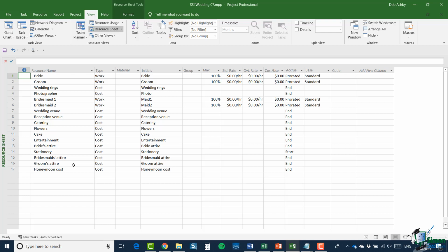And you might think, well, surely you're not going to pay for those venues at the end of using them. Well, no, but the important point here is that those resources are not assigned to the use of the venue. They're assigned to the booking. And the cost is incurred in the case of the wedding venue when we book the venue.